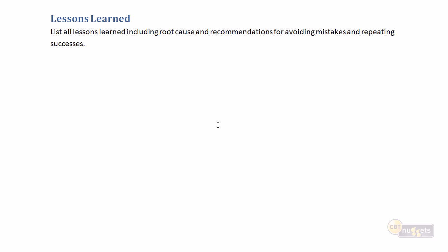Now we're going to do our lessons learned. Summarize all of the lessons learned, include the root cause analysis and the recommendations so that this particular chapter of the end of project report can be pulled out and taken to a corporate best practices repository, so that overall your organization is going to improve in its effectiveness as a result of your lessons learned.